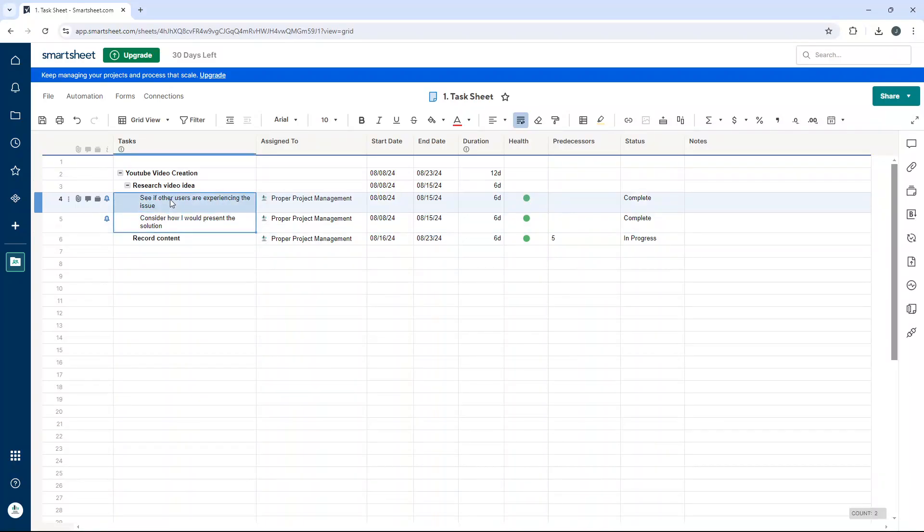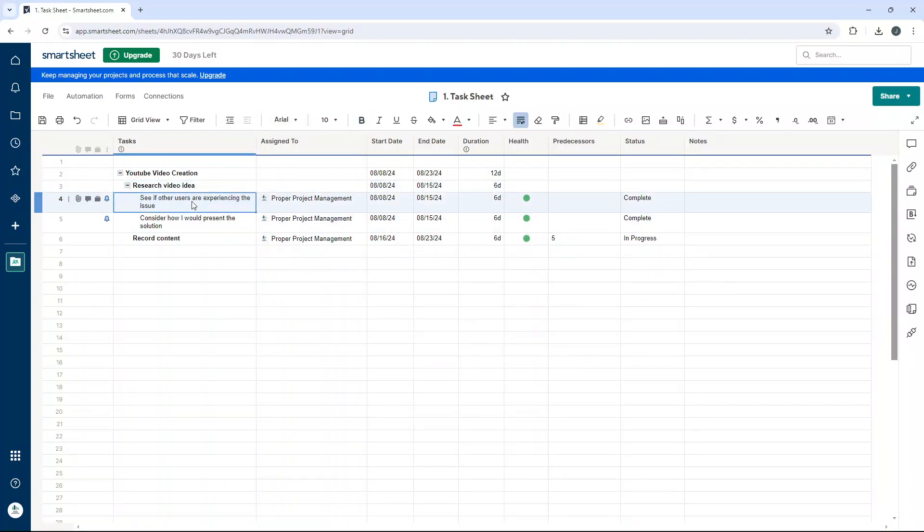Now, I just want to quickly show you how you can reverse all of this, because it may be that you want to change your parent row. Ultimately, it's the process in reverse. So I'm going to remove this relationship here by selecting these two cells, four and five, and we're going to use outdent.